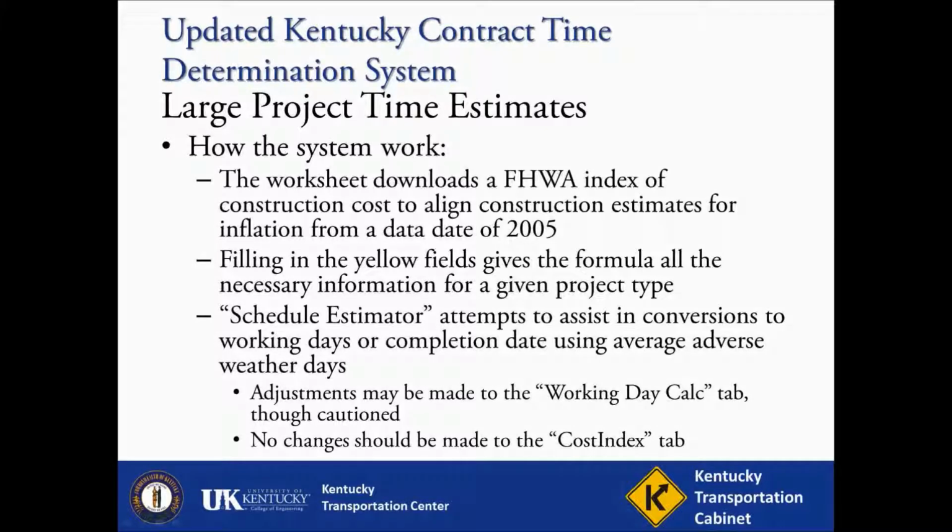Adjustments can be made to this conversion by adjusting the number of working days per week or the percentage of rainfall or temperature related concerns in the working day calculation tab. At no point should you adjust information in the cost index tab. Additionally, on the sheet are added guidance notes to inform you of the information and how it should be input in the fields.